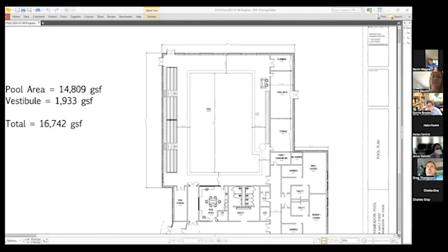The building as a whole becomes almost 1,000 square feet larger, right? So to Greg's point, 1,000 feet times $400 a square foot, 4 million. So it does become millions. Let's stop this conversation now. Seriously, we are so far above budget already.